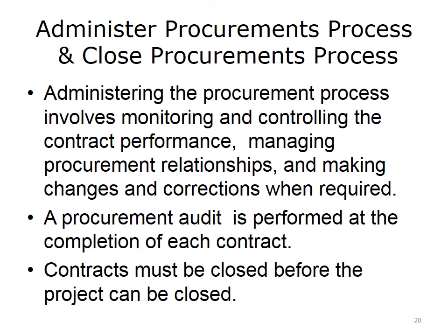Someone associated with the project manager, or a contract administrator, must be responsible to monitor and control the contract. Some of the responsibilities would include, but are not limited to, managing the procurement relationships between the buyer and seller, managing contract changes, resolving disputes, monitoring the contractor's work performance, conducting procurement performance reviews, verifying actual work performed versus what was stated in the contract, verifying work is accurate, correct, and satisfies the contract terms, authorizing and managing payment to